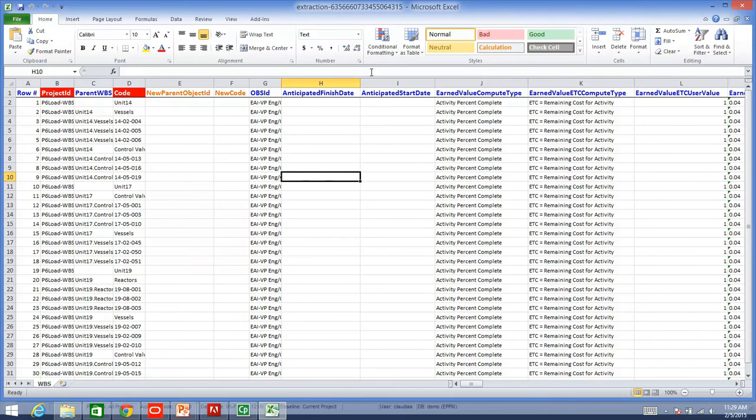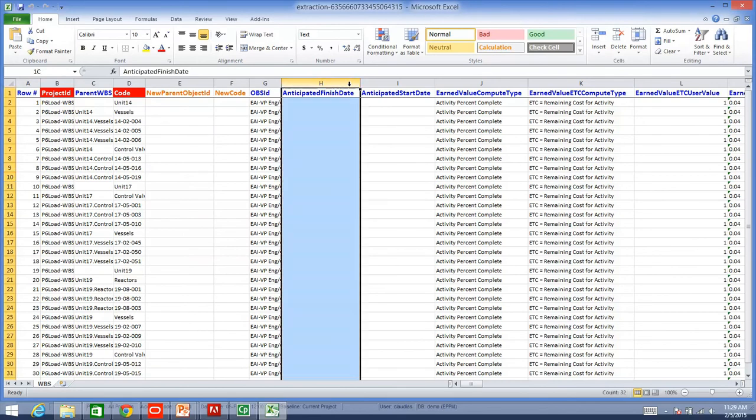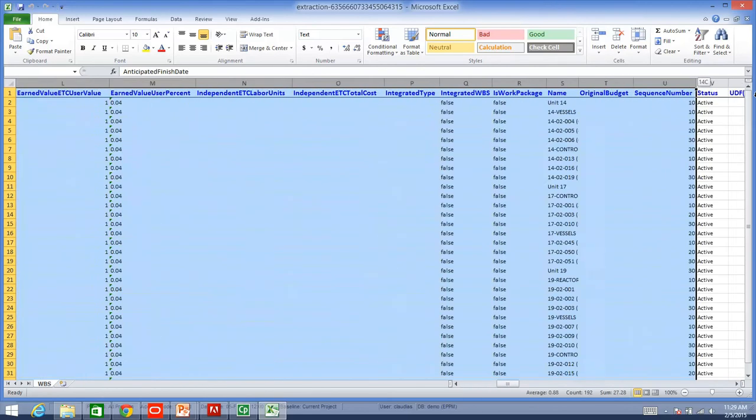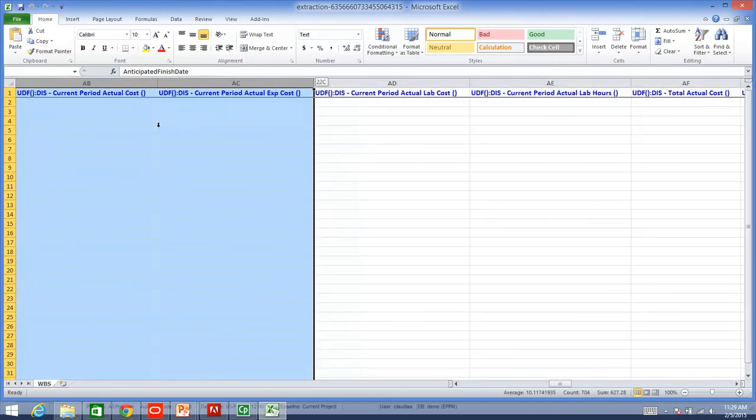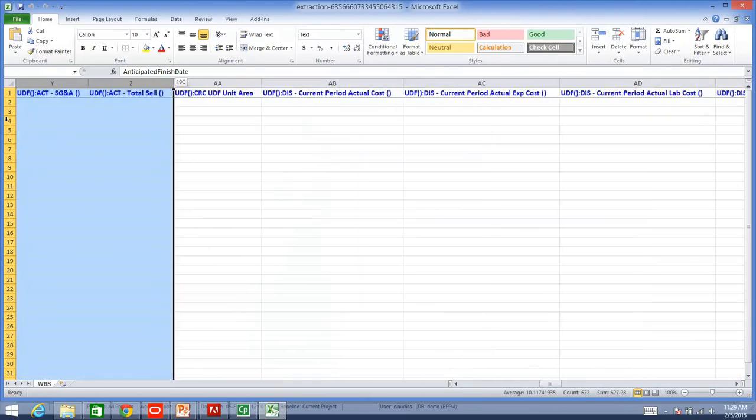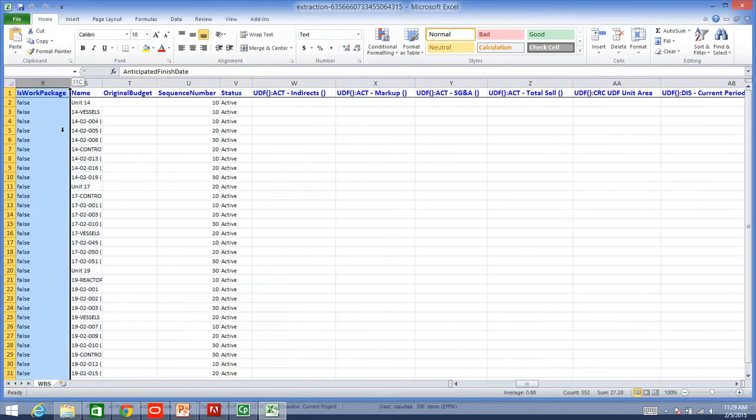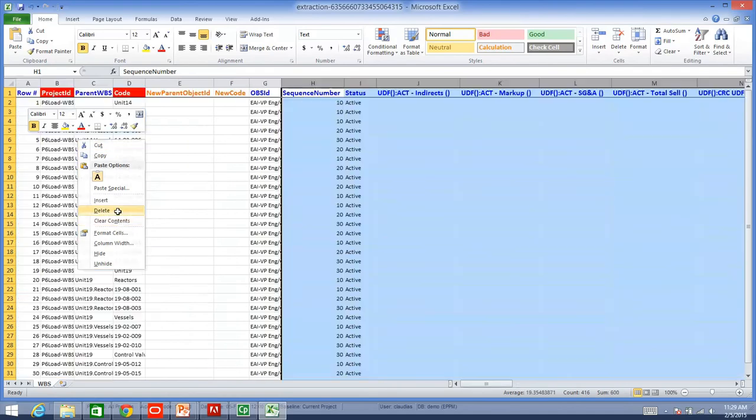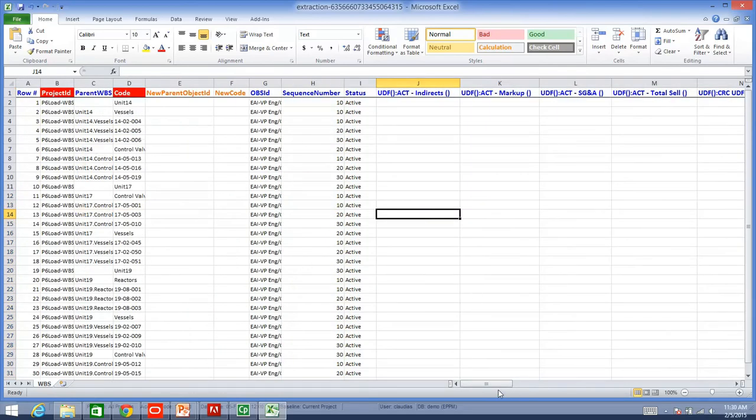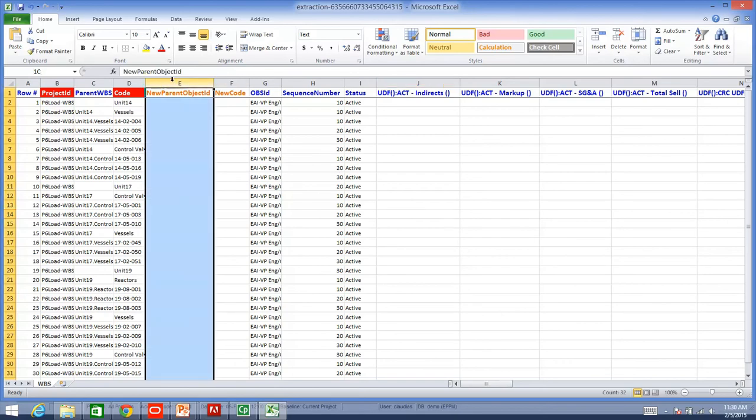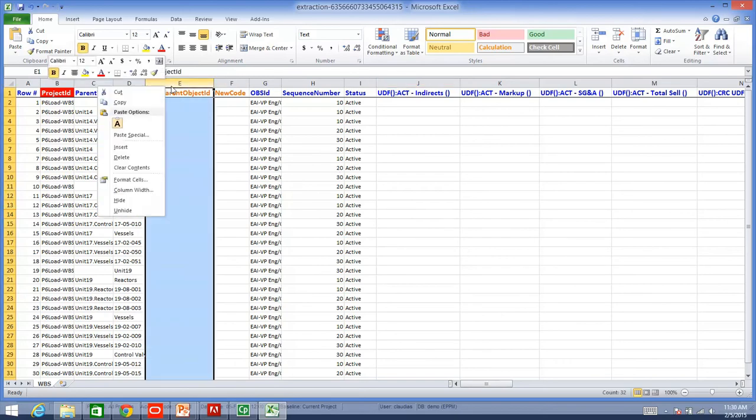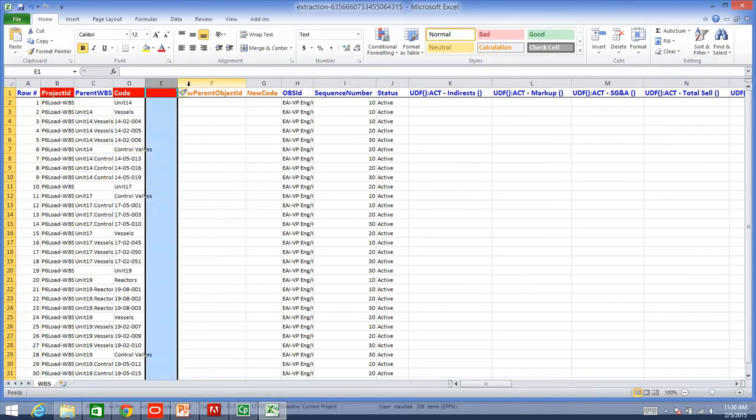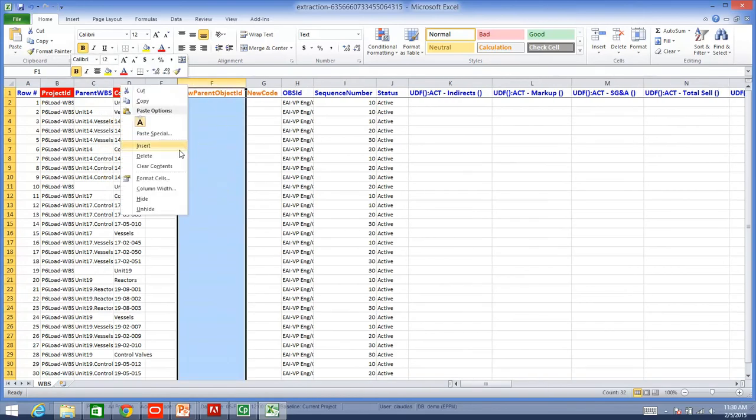I am just going to, for example, delete some columns that I won't need. I can do that. And then, because I want to add a new child to my parent WBS, I can do a formula in Excel, and I can add my new code.